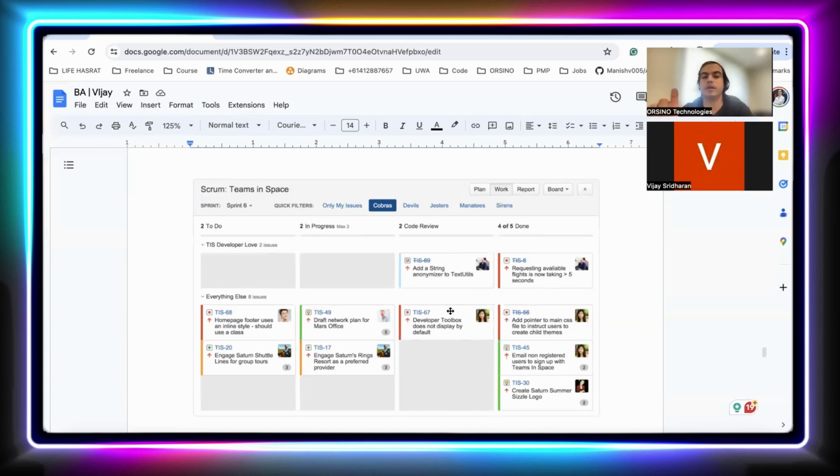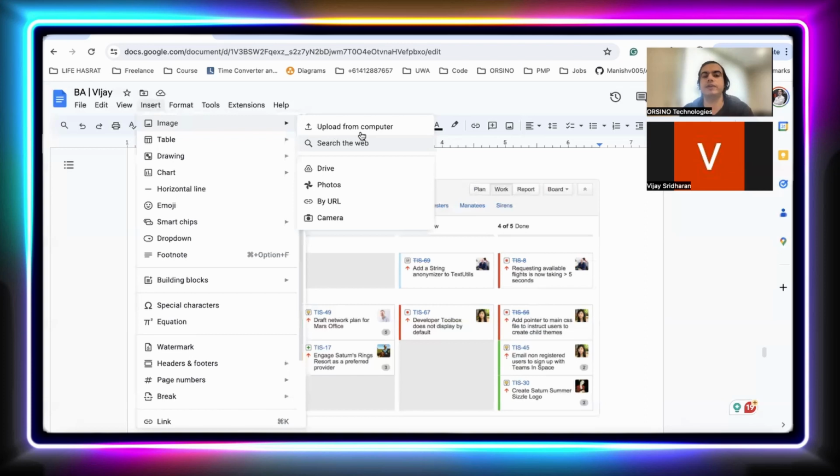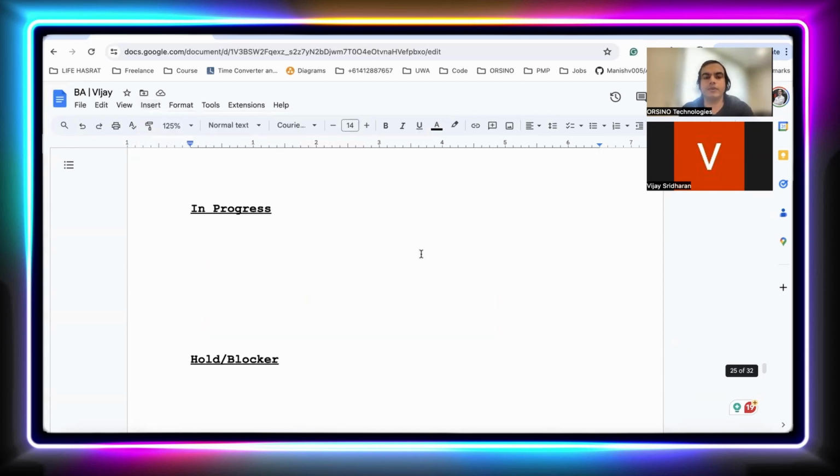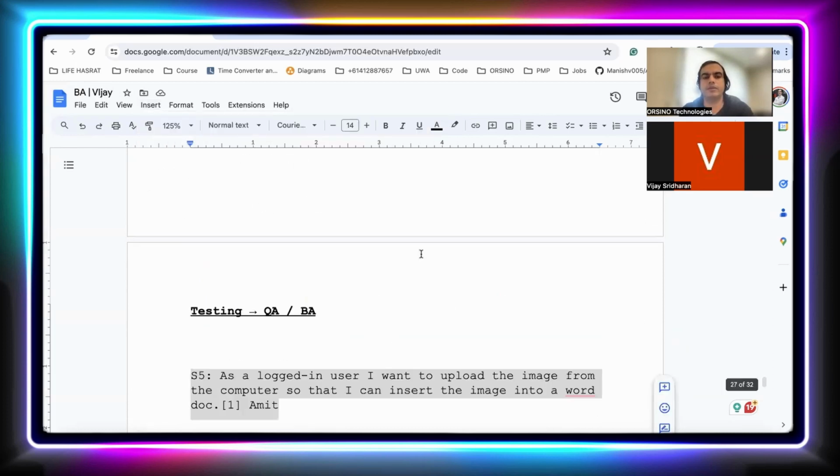So they will provide comments on which of the four acceptance criteria failed. For example, let's say this is the one we are discussing. Yes, everything is working fine, but they are able to upload any file format, whether it is JPG, PNG, PDF, text or CSV, which was not expected. It should support only the JPG format, let's say. Okay. Sure. So if this is an issue, you can't close that user story because it is not matching the acceptance criteria. It is not fulfilling all the requirements expected in this user story. Okay, sure. Makes sense. Yeah. So now let's say the testing team will have a look here and update the status.